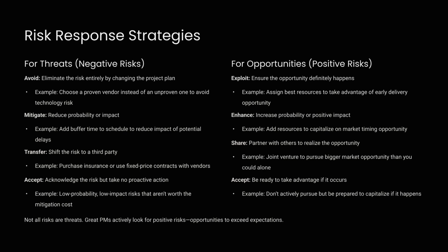For threats, strategies include avoid, mitigate, transfer, or accept. For opportunities, strategies are exploit, enhance, share, or accept. Great PMs look for positive risks, opportunities, as actively as they manage threats.